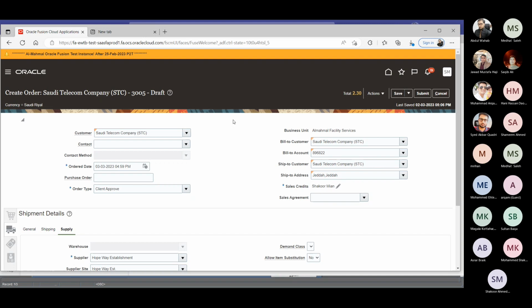If you attach this PDF here, he can get the notification. This is the request from this requester. He will get the quotation from the supplier. He will send it to you. You will go to the client and take the signature from the client on the quotation. If it's approved by the client, it is client approval. You will scan this client approval in your system and save it somewhere.